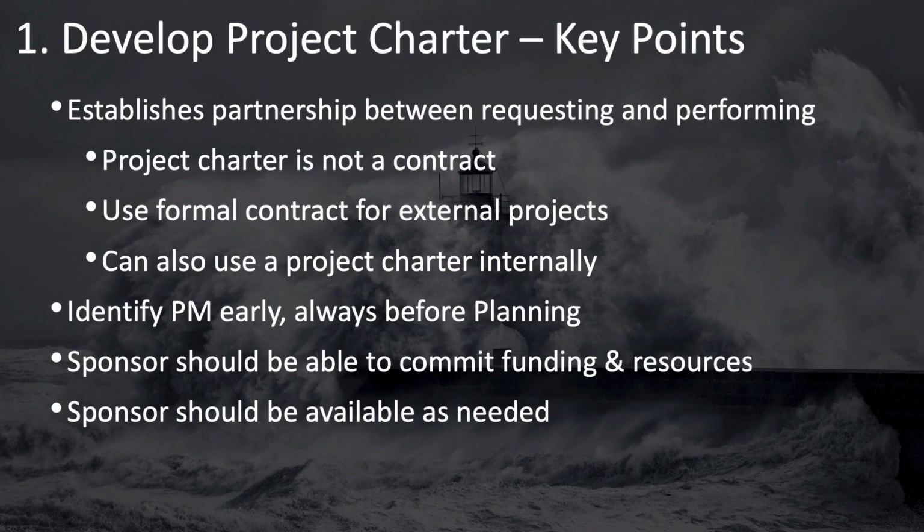if not earlier. The project manager can be very helpful, and it can benefit the project manager if they're involved in the needs assessment, the business case, and the benefits management plan. However, no matter when the project manager is involved, it definitely needs to always be before the planning processes, which will develop the project management plan.